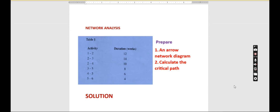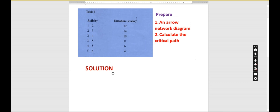We have our table here with the activities and their durations. Activity 1 to 2 is 12 weeks, activity 2 to 3 is 14 weeks, activity 2 to 4 is 10 weeks, activity 3 to 5 is 8 weeks, activity 4 to 5 is 6 weeks, and activity 5 to 6 is 4 weeks. Now let's draw the arrow network diagram and from there calculate the critical path.